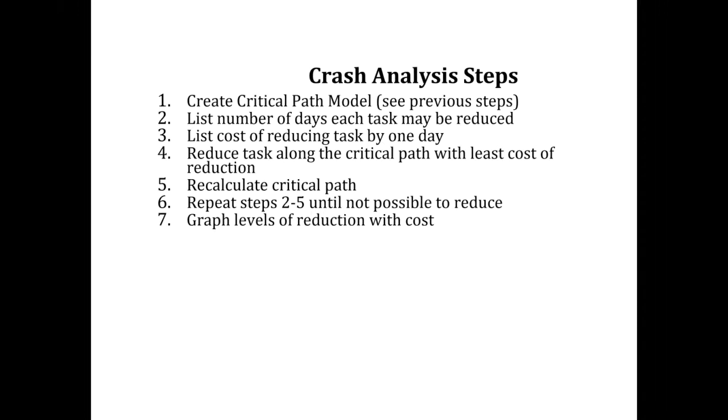So in terms of a crash analysis, some of the key steps involved: you start with creating a critical path, then you list the number of days each task may be reduced by, then you list the cost of reducing tasks by 1 day, reduce the task along the critical path with the least cost of reduction, and then you recreate the critical path.